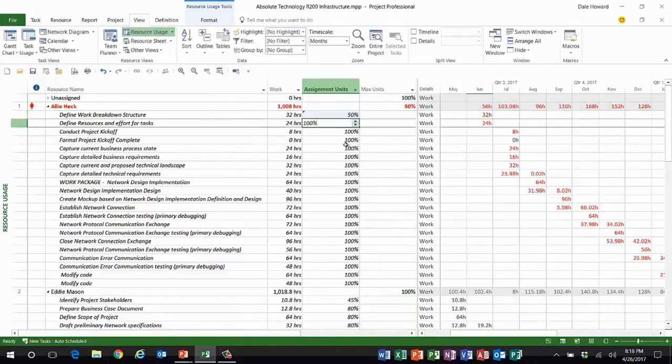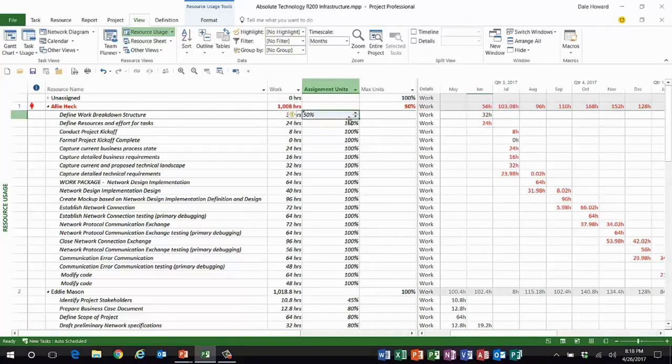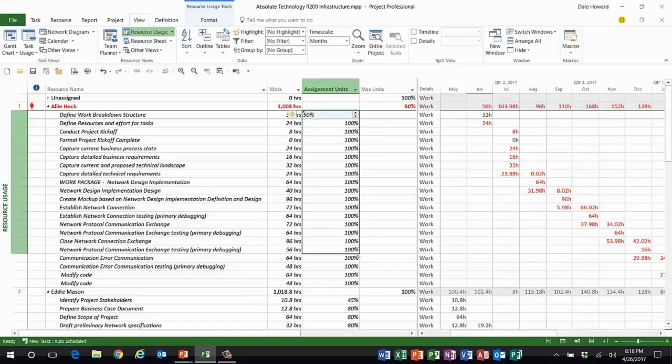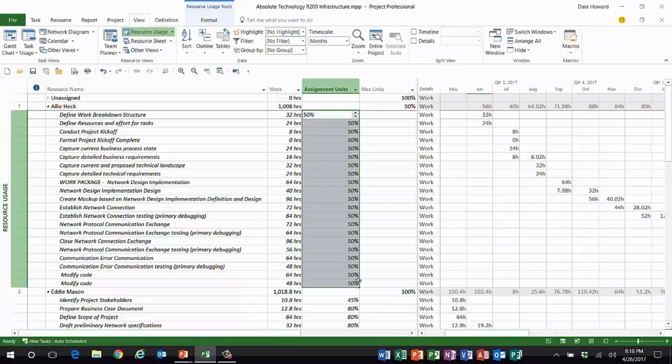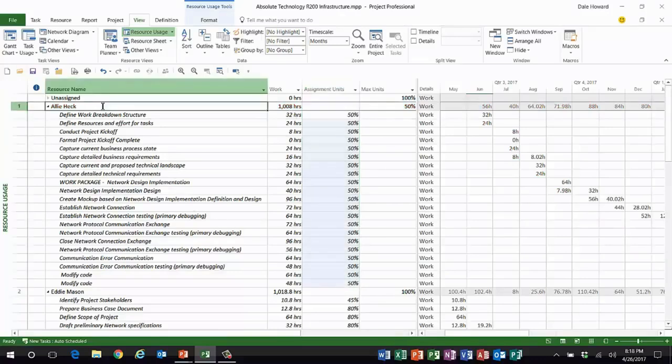I'll change Allie's units value or assignment units value to 50%. And then I'll use the fill handle in Microsoft Project, just like in Excel. I'm going to copy the 50% down all the way to the end. Bingo. Now, look, the overallocation has gone away.